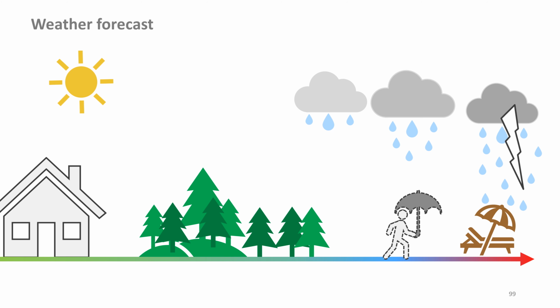Of course, we also have this issue in Agile planning. Our planning is designed to be adaptable. This allows us to make conscious decisions about how we deal with certain situations. Let us say we realize today that we will not reach our expected goal in the next 3 sprints. Then we can immediately talk about it and think of countermeasures, such as: can another team support us?